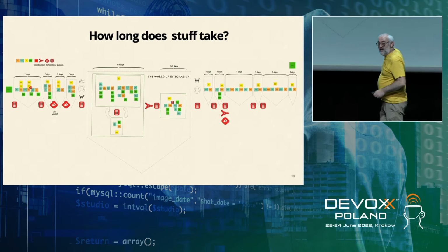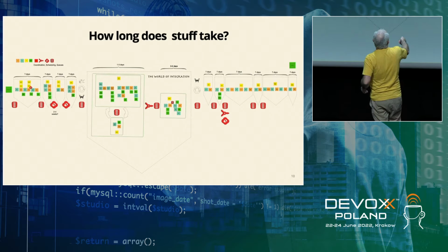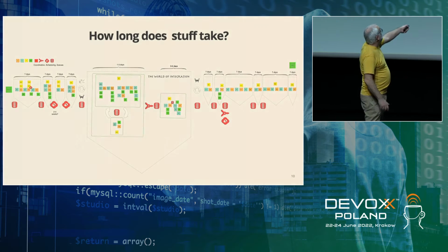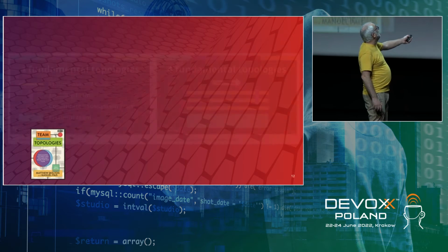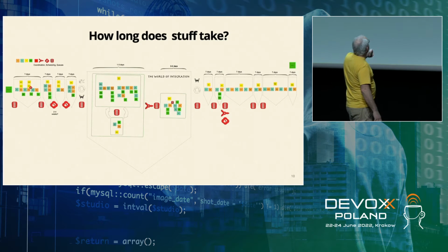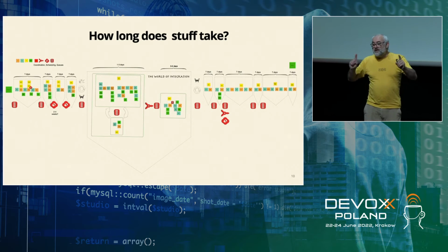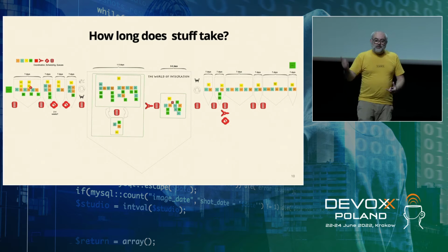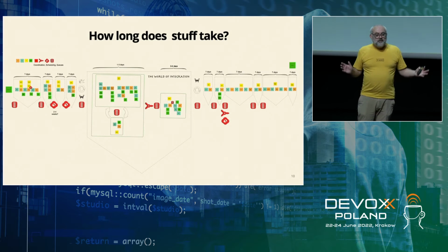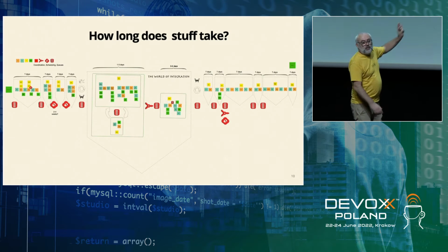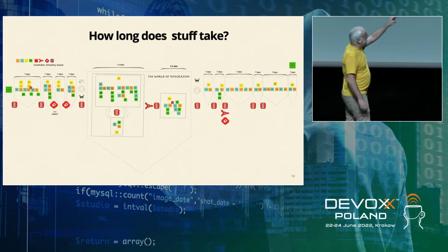That's really long, right? If I point out with my laser, this little thing here, that's writing code. That's it. That's the only code that's been written in the whole process, is that little bit there. All the rest of it, this bit here, there's two different types of data architect who've each got their own model, enterprise model, canonical model. They just go around in circles for about 4 weeks, updating each other's model. Has no effect on the process at all, apart from blocking the whole thing for 4 weeks, right? And then some code gets written, and it goes through a series of 8 weeks integration, 8 weeks regression, 8 weeks set, et cetera, performance until finally something happens in production.